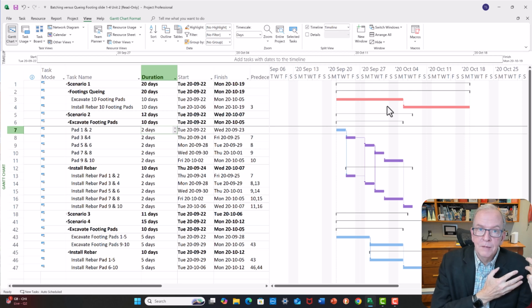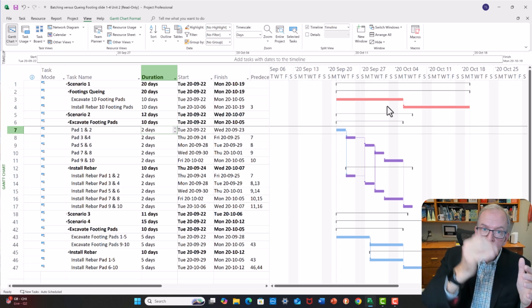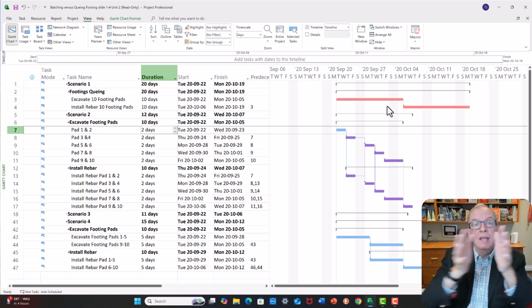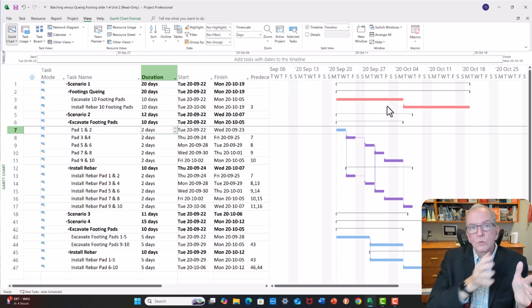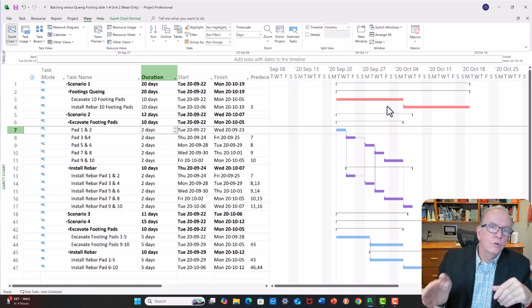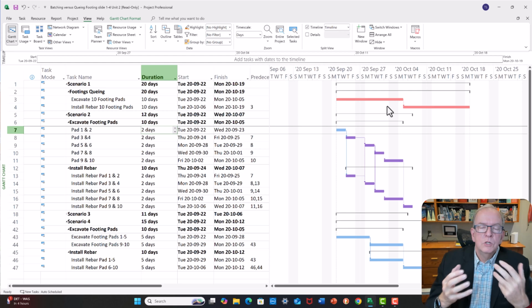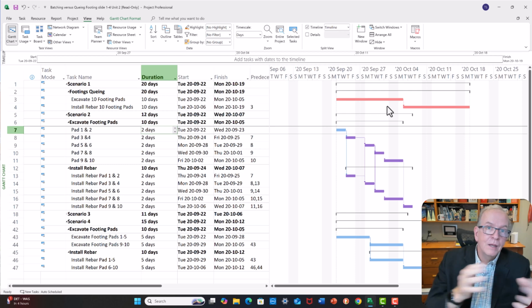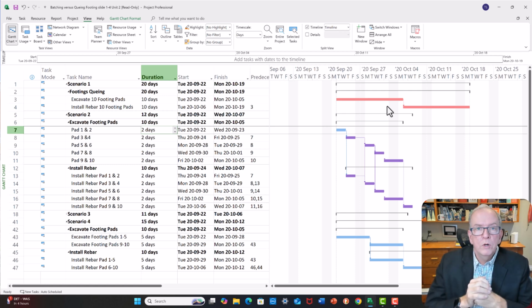Like the book example I'm just giving you, you've got small batches. They're working on the copy edits for each chapter as it goes along. They're not waiting till they've got 16 and then have a ton of work to do, which is going to basically double the schedule. I use this all the time in everything I do. I look at how we can make the batches smaller to improve the flow. Much, much better, much less stressful. Quicker feedback. I've already been getting feedback on the copy edits for the various chapters. This works wonderfully well.